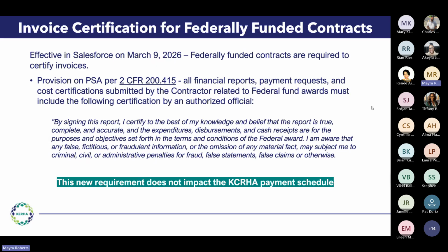Effective in Salesforce on March 9, 2026, federally funded contracts are required to certify invoices. This provision is in the PSA. Per 2 CFR 200.415, all financial reports, payment requests, and cost certifications submitted by the contractor related to federal fund awards must include the following certification by an authorized official. This certification is included before the agency submits the invoice.